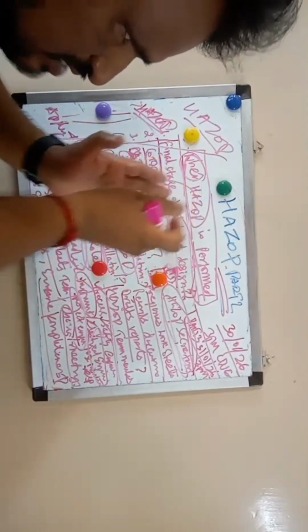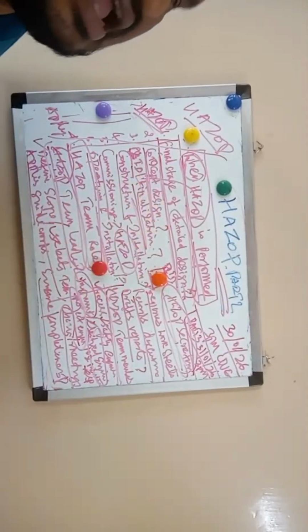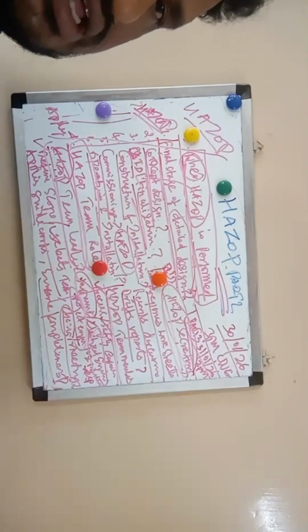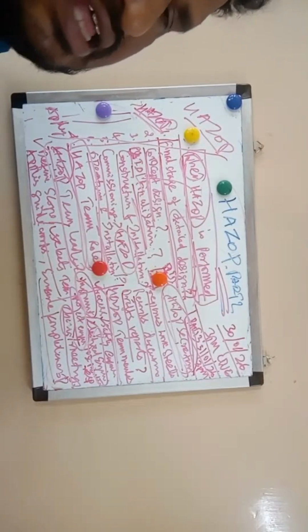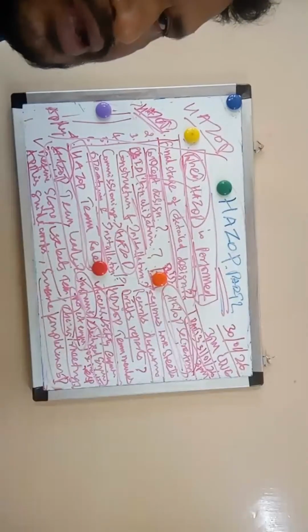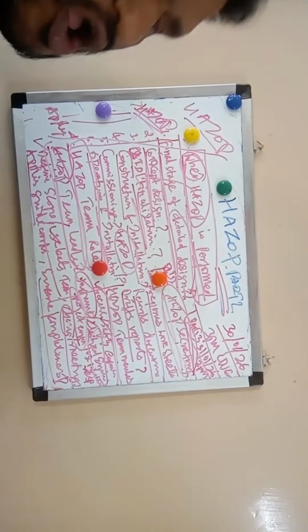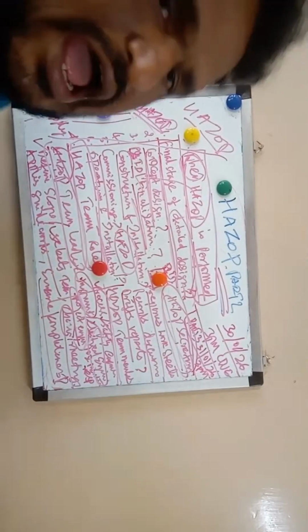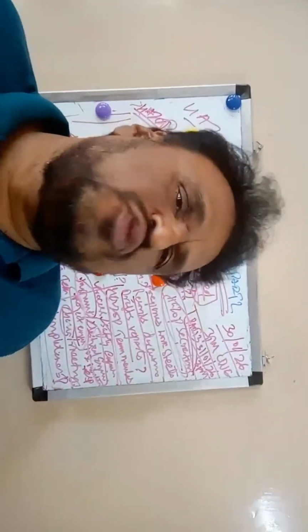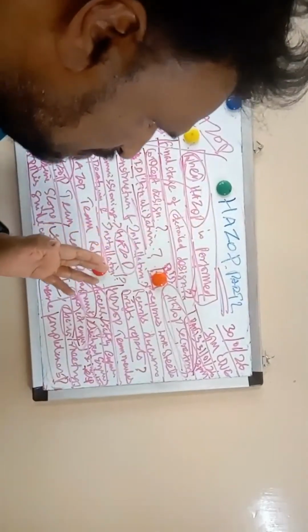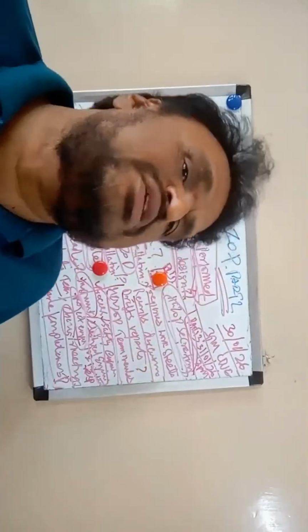So during the construction time itself, when you find out the hazards and abnormalities, it is easy for the operations. When it comes to the operations, after commissioning, there will be operations. In operation, you cannot do anything, because HAZOP is a proactive step. HAZOP is a proactive safety measure. So for proactive safety measures, you have to take them before commissioning itself. That's why HAZOP is performed before commissioning.